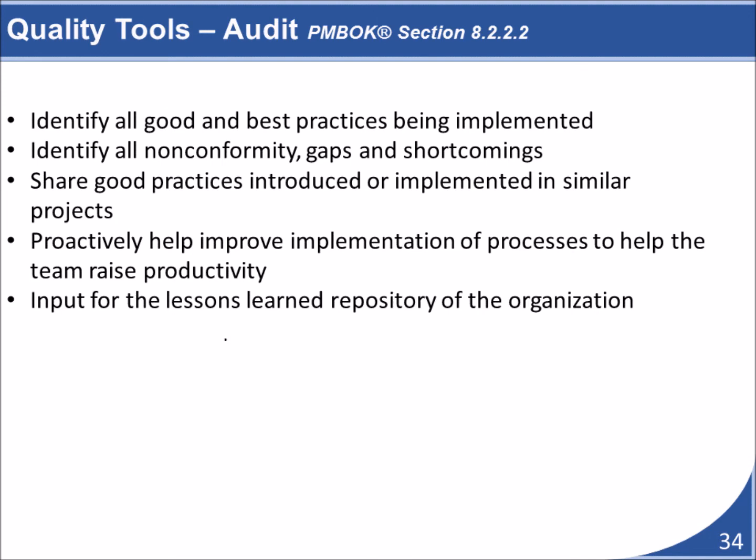For example, change management is a large part of all projects. You may wish to conduct a quality audit to confirm that the change management process was followed throughout the project. This audit might include ensuring that all changes to the project scope were properly identified, analyzed, and assessed. All change requests followed a structured approval process. The project's resources and schedules were adjusted to accommodate approved changes. Only changes that had been formally approved were implemented.